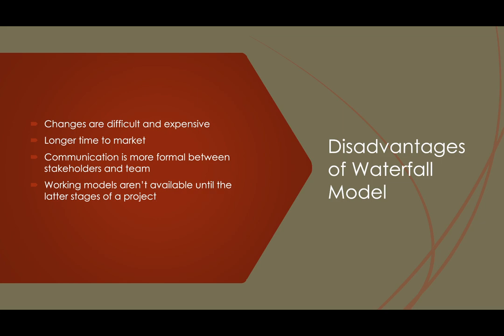Now, what are the disadvantages because of which organizations are moving from waterfall to Agile? Changes are difficult and expensive. The waterfall method generally discourages changes to the project scope because an extensive amount of time is spent in the beginning trying to get the plan right.